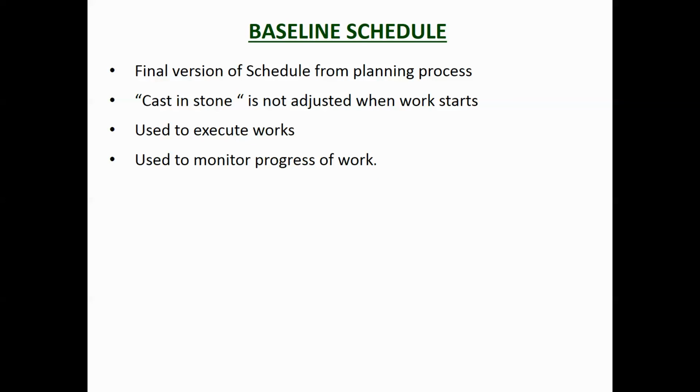So that's the baseline schedule. This is what you would go to tender on, so that if you're a contractor for a construction project, this is what you'd base your tender price on, and this is what you submit to the client. If it's a consultancy contract, this is what you'd submit. Now this is cast in stone. It's not adjusted when the work starts.